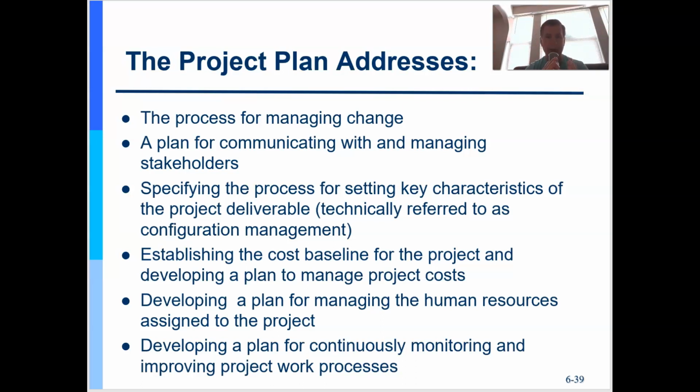So the business documents, now down to the charter. Now we're ready to build that detailed project plan that is going to get us where we need to go. And I mean detail, right? So down to the activity. If you're building a hairdryer, right? It's going to be how many ohms or amps when you plug it in. Is it going to be European standard or US standard, or what standard, right? Who's in charge? What's the due date? What resources do you need, including plastics, including electricians, so people and things. These all go into what safety requirements, what quality standards are all going to get detailed out.